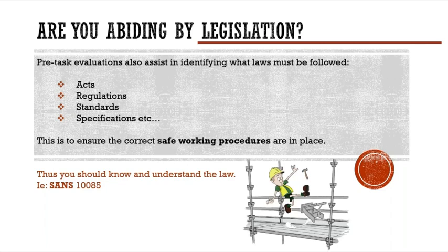But when we do an evaluation of what is needed now to get onto the roof, the safe means of access becomes a scaffold, the use of a scaffold. We might not be working on that scaffold, but we are using it to access a certain area. The minute we are now working on a scaffold, we start working at heights. And yes, a scaffold is safe enough to be able to work on its platform or walk on its platform without a harness. But what about the area that you are accessing, like the roof? Is there a parapet wall? Is there a lifeline setup? This type of evaluation helps us to take into account not just the task being performed, using a jet of air or a jet of water or setting up a JoJo tank or anything plumbing related or whatever task you are performing, that will come into play after the safe means of access to the job.